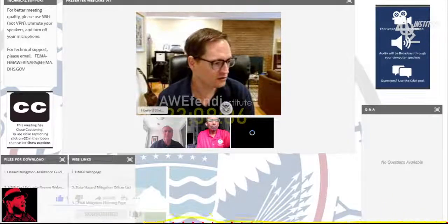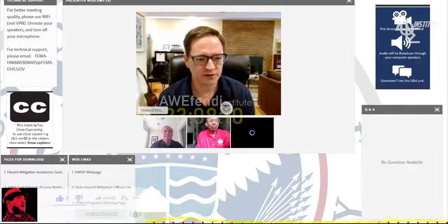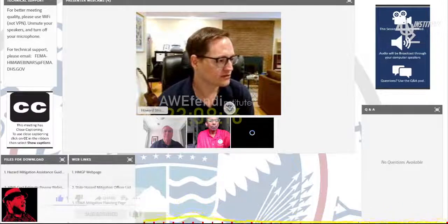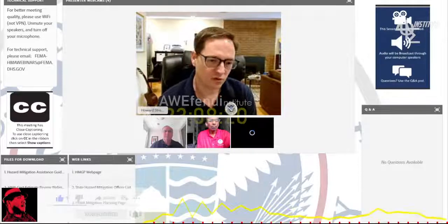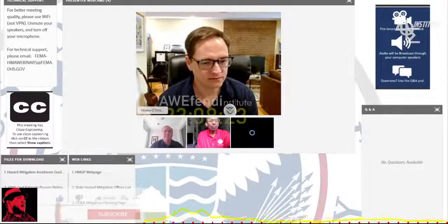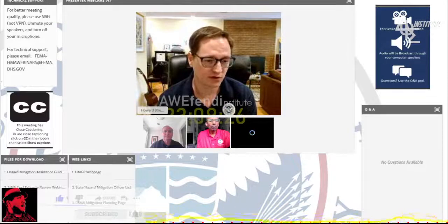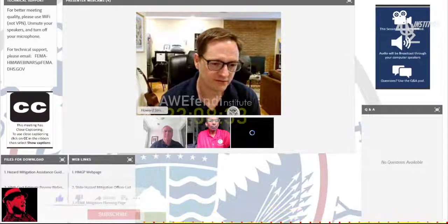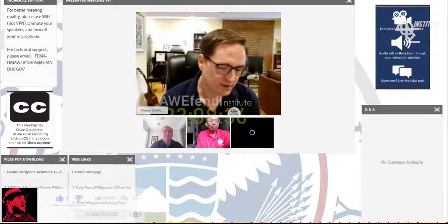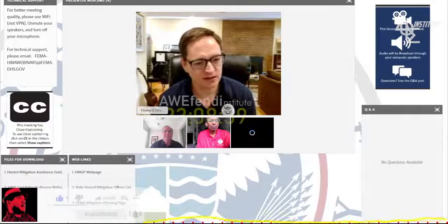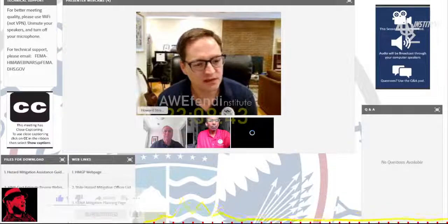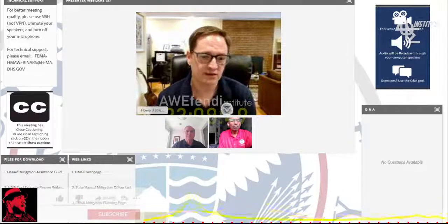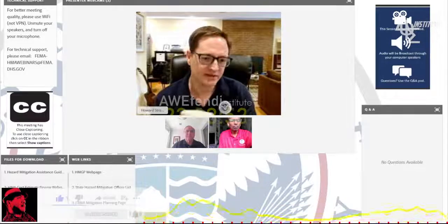All contracts should be competitively procured with relation to HMA grants, and so you need to ensure that if you're a local community, you're following your local procurement requirements, state procurement requirements, and also federal procurement requirements. In terms of the federal procurement requirements, there are some great resources that FEMA has online from our Procurement Disaster Assistance Team. You go to FEMA.gov and just search for procurement disaster assistance team. There's a lot of great information available there to help particularly local officials understand what the federal requirements are and how to comply with them.